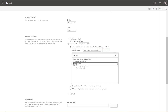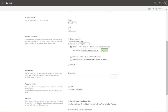So only leaf-level values can be selected, not parent values with children. For 'Allow multiple values to be selected from a lookup table' — as a rule, always do NOT allow this. The reason is it becomes a reporting nightmare: if you're trying to group projects by program and a project appears in two programs, you could be double-counting in Power BI if you don't account for that.